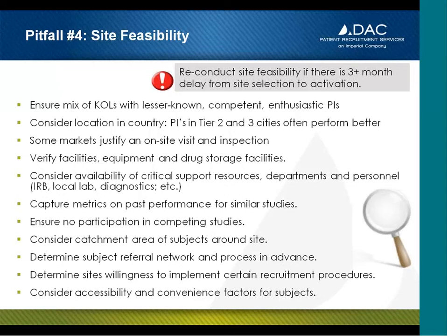If you find that more than 3 months elapse from the time of site selection to site initiation, consider revisiting at a minimum the timing and competing studies portion of the feasibility exercise with the sites to determine enrollment impact on a particular study. Definitely document this discussion in the recruitment plan, which will help ensure open communication down the road, and it also lays out expectations for the sponsor and the sites alike very early on in the process.